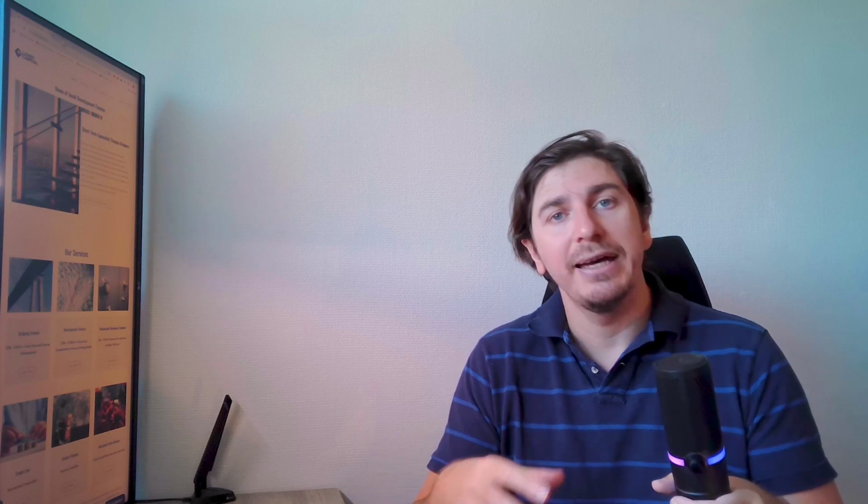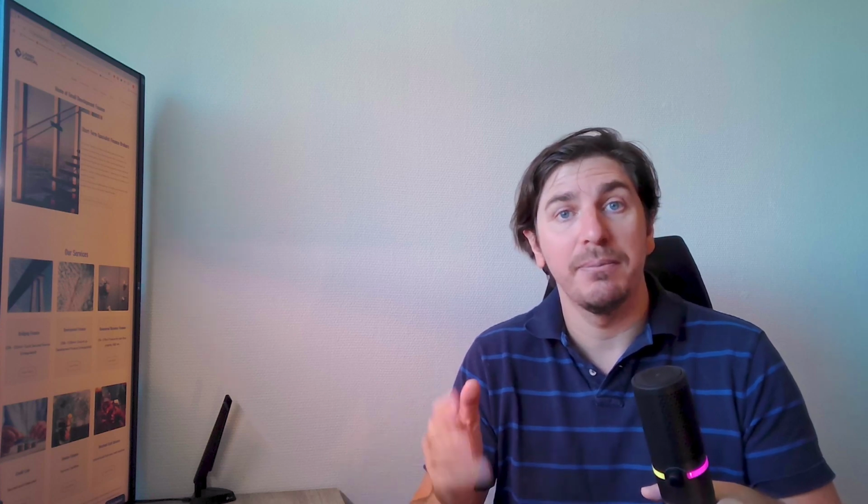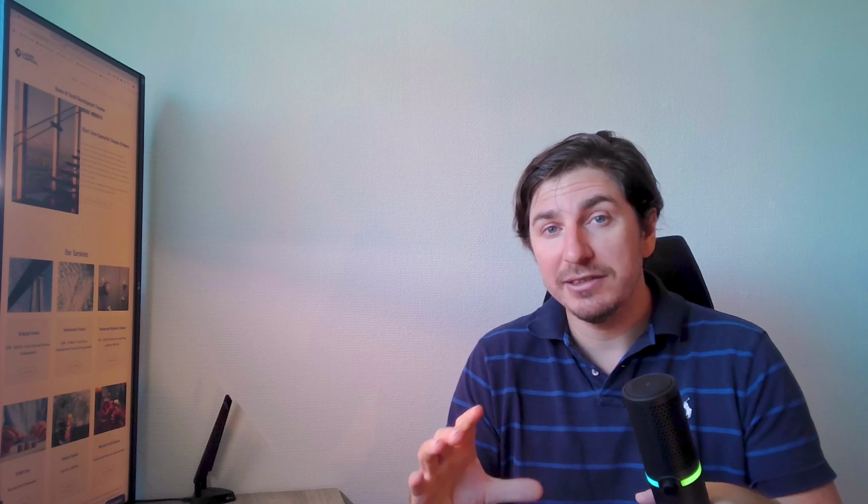That's roughly where you're looking. Interest rates can vary massively depending on your project. A rough rule of thumb, if you're working out, is somewhere between 1% and 1.25% per month. Each lender works out their interest slightly differently, so it depends on when you draw down the loan, etc. But you're looking at roughly 12 to 16% per annum. Annualized, that works out a little bit less typically.